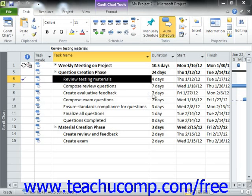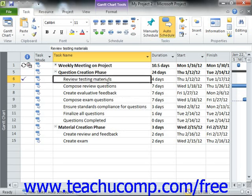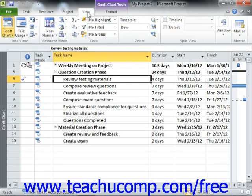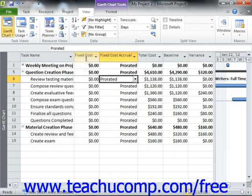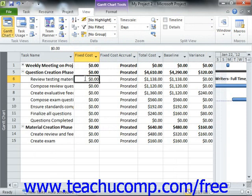To do this, select the task for which you want to enter the fixed costs. Next, click the Tables drop-down button that appears in the Data Group on the View tab in the ribbon. From the drop-down menu that appears, select the Cost choice. In the new Fixed Cost column that appears next to the tasks, you can then enter the amount to set as a fixed cost for the task. This total amount will then be added to other resource costs within Project Reports for the task.